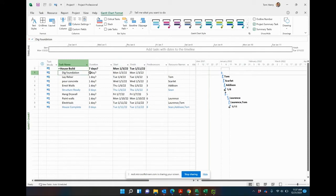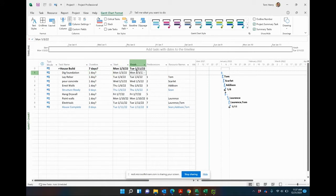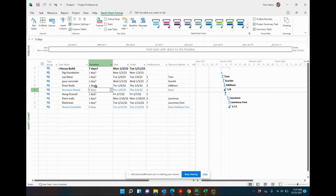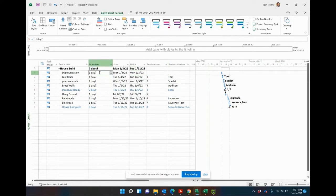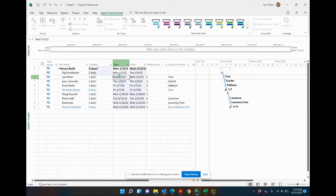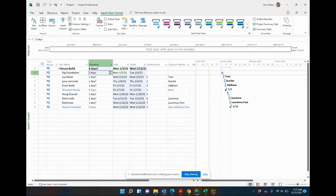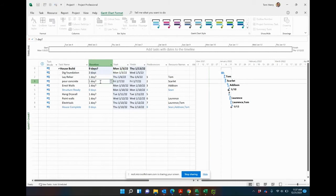Before we do that, I want to explain what I mean by that. The duration is simply the delta between the start and finish date of a given task. In this project schedule I've actually gone in and done my predecessors. For example, if I make this two days, you can see that the delta between one three and one four is now two days. Starts on Monday, finishes on Tuesday, two days, three days, you see that happens, that goes to Wednesday and everything else is trickling on from that.